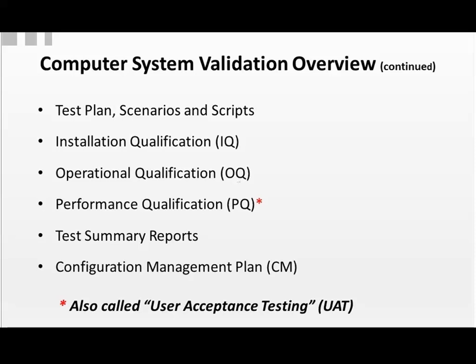A configuration management plan is also important, because at the end of your implementation, you want to have a frozen copy of what the configuration looks like, if it's configurable. All of this should be under strict change control. Each one of the deliverables should be done in the right chronological order and sequence. And you should progress to each one when you've fully accepted the results of the one prior.